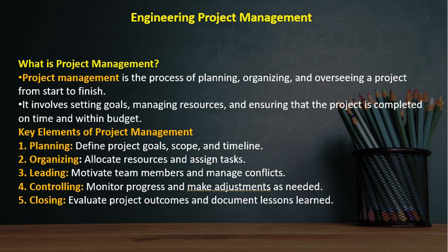Closing is you take the project, give it to the client. You take feedback from your team members. You look at the record of the project and see what things you should do in future and what things you should not do in future. So closing involves learning from your experience. The very important part of closing is learning from your experience. You look at the documents, take the feedback from the client, from the team members, from your boss, and see what improvements you can do in the future. Got it? Clear? Any questions?